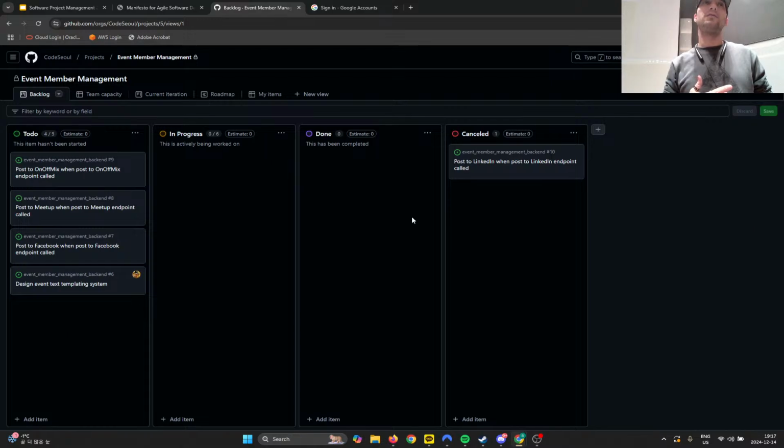so it becomes a priority because, let's say you're having a production application. So if a bug shows up and this one is shipped already, you need somebody to do a hotfix on that. So basically you just put a hotfix column, and if people see the hotfix column, you react on that very fast.